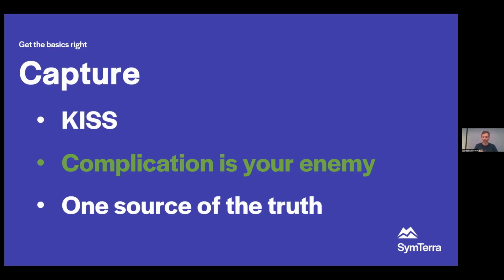They give the impression of quality assurance, but they lead to users simply ticking the right answer each time without doing the assessment the question is meant to fulfill. So instead of having 20 questions, ask them a question, get them to enter their assessment. Is the site fit for purpose to undertake the works? Can they proceed with the works? Have they got the right information to hand? And instead of hundreds, thousands of yes/no questions and answers in your database, you'll get real insights into your project and be able to leverage that for future works and learn from that as you go on, thus improving efficiencies and safety on your jobs.